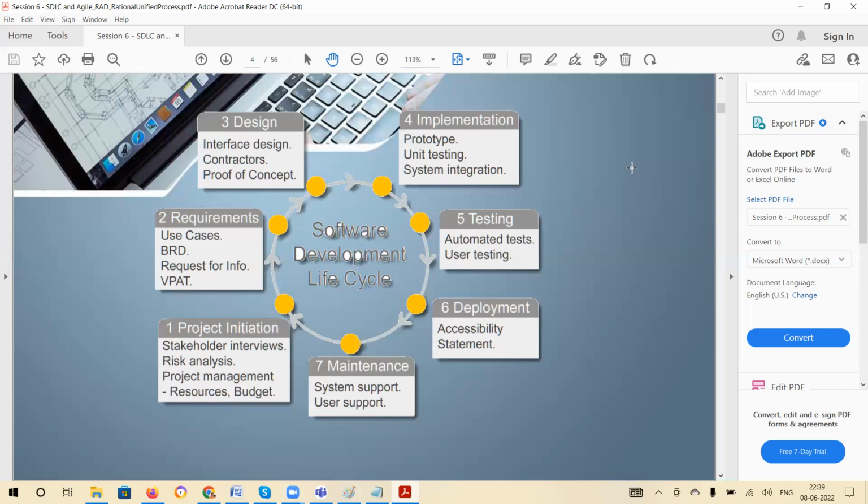Then you also have to maintain, right? If tomorrow some error comes, who will fix it? You will fix it. So we call it maintenance. And of course, companies will also charge money for maintenance. Maintenance is like, the customer is using a product, but they might come across some bugs, or need to make some small modifications. Generally 6 months to 1 year of maintenance is free because you'll expect a lot of errors there.